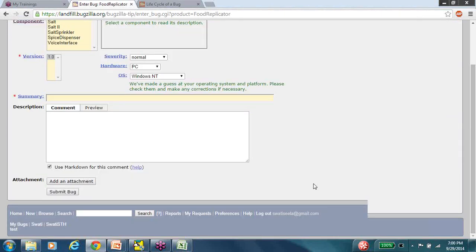Gain is normally, ideally I'm telling you, it's not adding up in this case, but ideally gain is when you are supposed to finish a job in 24 hours, you've done it in 18. In that case, the gain is 6 hours or 25%. So the gain is nothing but how much ahead you finished and how much time we saved as a result of that.